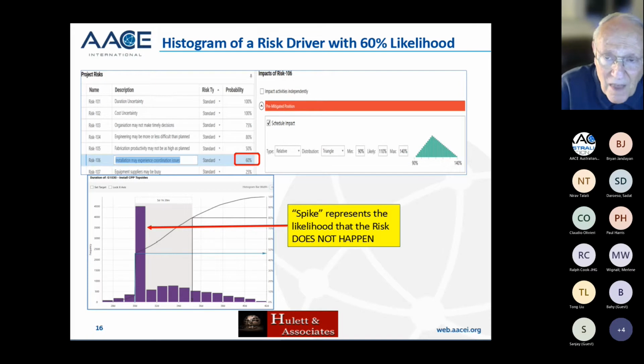If it doesn't occur, then none of this distribution applies. The 30 days is accurate, according to the fact that if this is the only risk happening and there's no uncertainty, this is just all that's happening for this one idea. There's 40% of the iterations of the 10,000 iterations in that spike, plus some extra. Actually, there's 4,500 occurrences in a 10,000 iteration schedule.